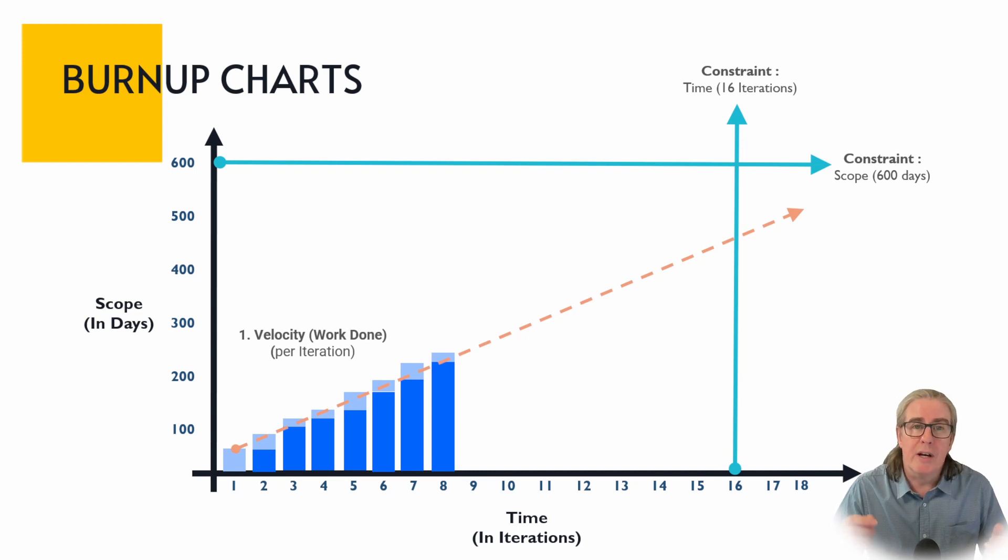Once you've worked out and tracked the amount of work done that you've managed to get done every iteration then you can make a projection. And the projection is based on what's called your velocity, how much work you're getting done in each period of time within each iteration. And by doing that you're able to then make a projection to see where this is going, if you keep going at this sort of rate, how far are you going to get?